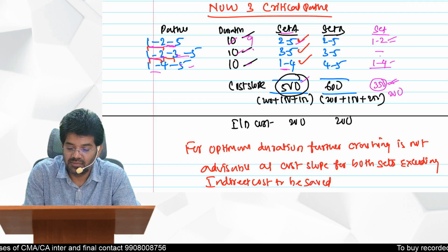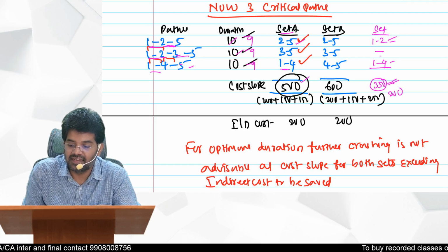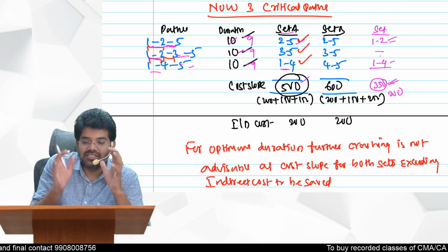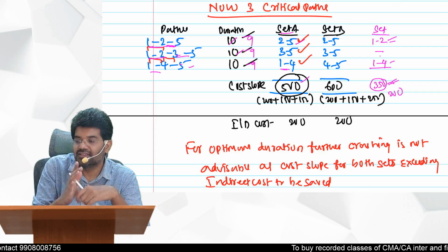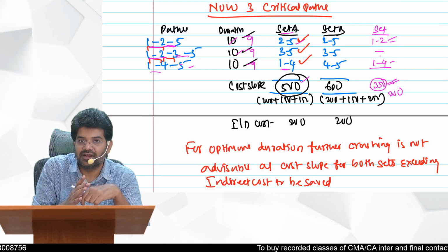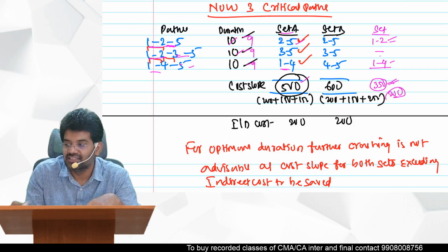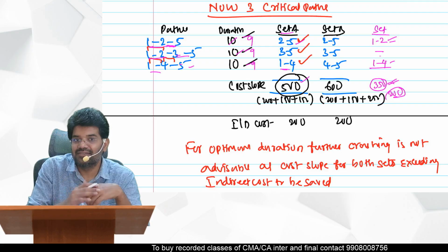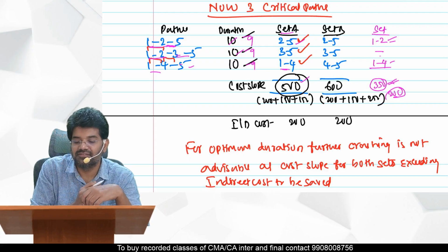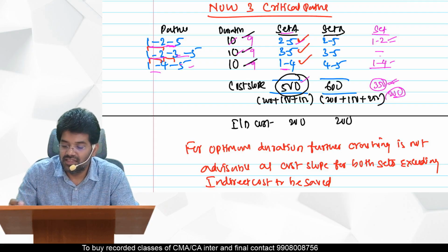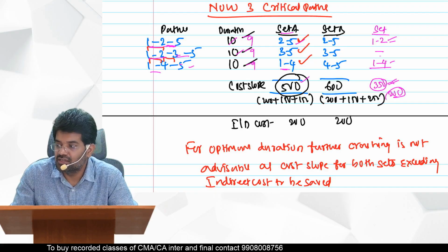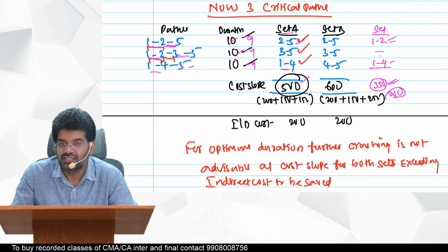9. This also will become 9. This also will become what? 9. So that means overall your project is getting reduced by 1 day only. Yes or no? Yes, that means only 1 day saving is happening. So you should take 1 day savings only. Don't take 2 days savings. Only 1 day you can save. So in this set, again 350 is the cost, but savings is only 200.